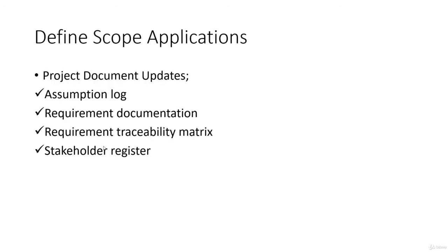And these are the updates. You will update your assumption log, requirement documentation, requirement traceability matrix, and stakeholder register based on the information coming out of the define scope activity. So that's it for now.